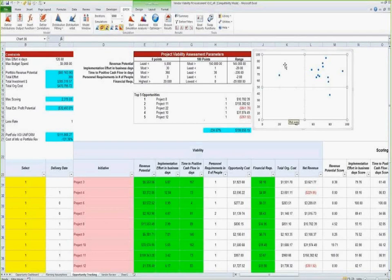this is a spin-off. So everything you would spin off would have a fit score of above 50 and a viability score of less than 50. So using if statements, or basically just by the scoring, you could actually pull, using if statements, you could have just put names to those opportunities. And it is in the spreadsheet, but it all comes out to being the math.